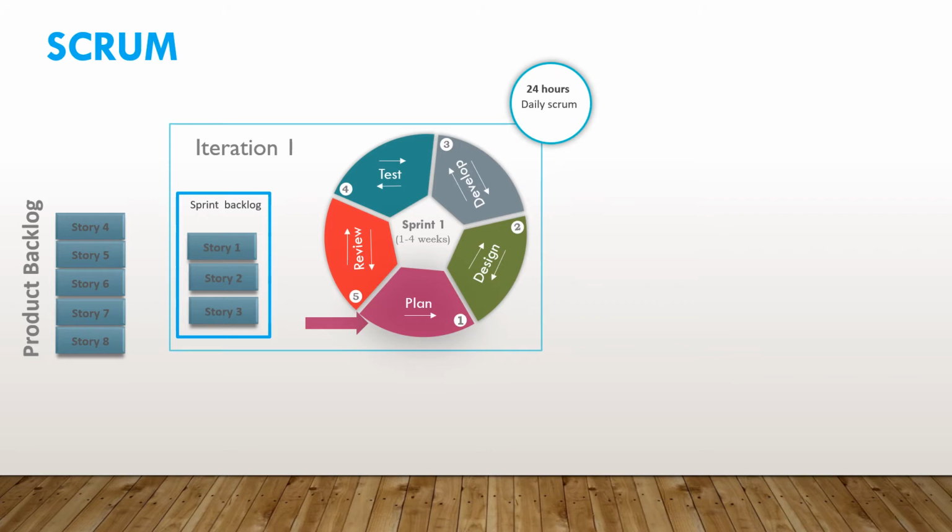During the sprint, every day the team meets for 15 minutes in a daily meeting, which is often called the daily stand-up, which helps the team get an overview of how the team is progressing. To conclude the sprint, the team carries out a sprint retrospective under the moderation of the Scrum Master, where the team discusses and finds out what could be changed that might make the next sprint more productive.